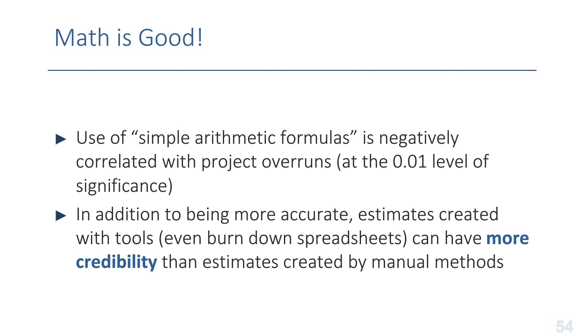I would say further that if you can actually expose the math, even having some tool support behind it, whether it's a traditional software estimation tool or a release burn down that produces a graph like the one I started this segment with, there can be more credibility for that estimate. It might not be better founded than one that you do with paper and pencil and a calculator, but nice looking output can give you some more credibility as you go to present and defend that estimate, and sometimes that can be helpful too.